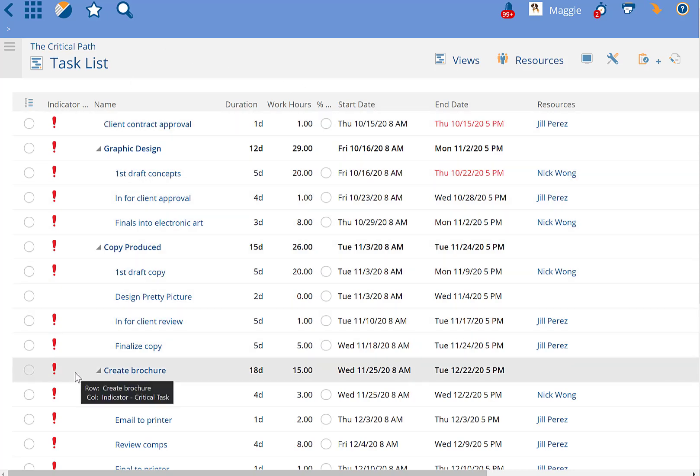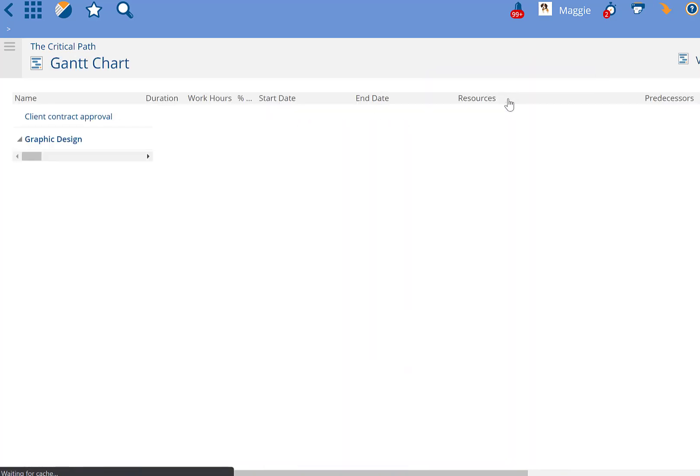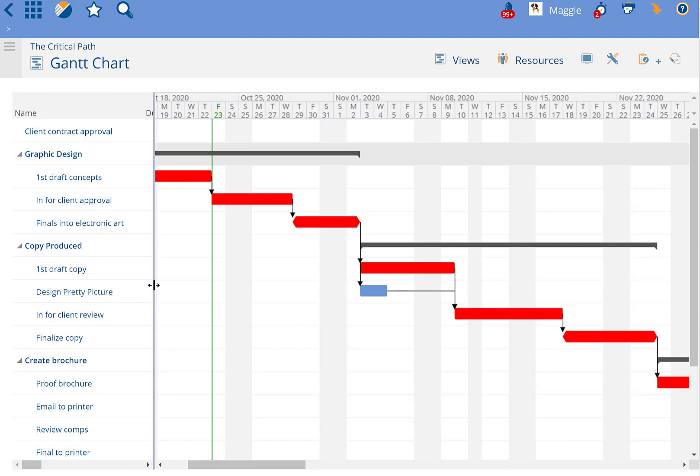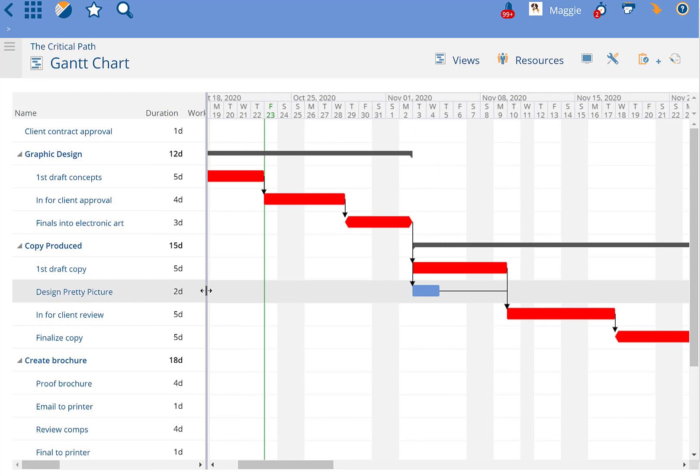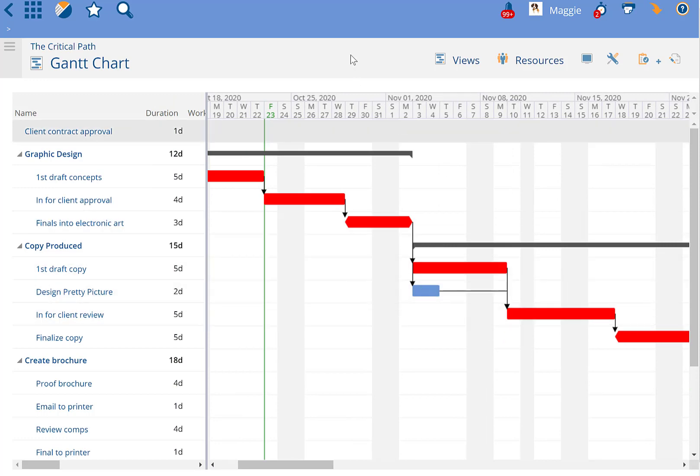They're all along the waterfall style of first comes task A, then comes task B, then comes task C, except I have this one rogue task in here, Design a Pretty Picture, that happens at the same time as the first draft copy. So because it does not affect the end date of the project, this task is not on the critical path.